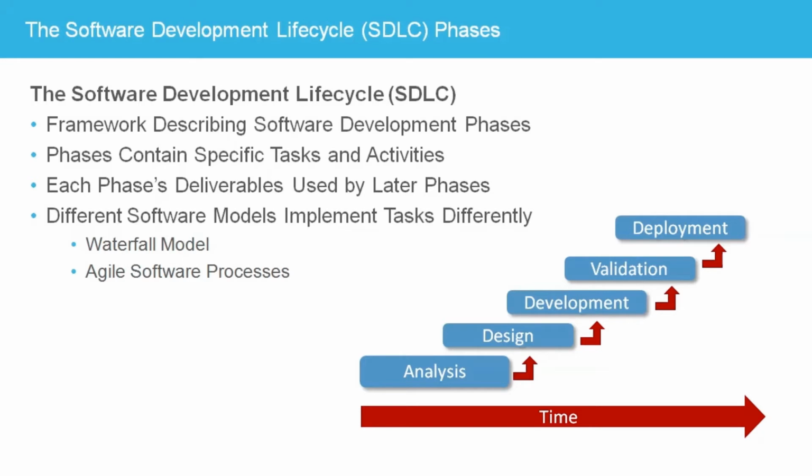The design phase uses the requirements document as input to create a detailed system design, stating exactly how the software will be built to satisfy the requirements. The designs created include the architectural, software, and database design, as well as user interface mockups. Other activities in this phase include selection of software tools and quality assurance planning. All this work is detailed in the high-level and detailed design documents and the quality assurance test plan.